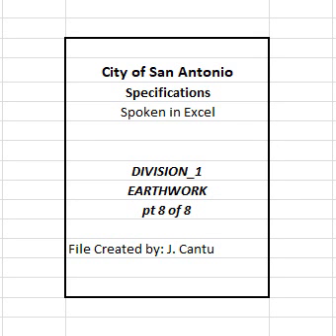This price is full compensation for shaping existing material, loosening, mixing, pulverizing, providing cement, spreading, applying cement, compacting, finishing, curing materials, shaping and maintaining shape, replacing mixture, disposing of loosened materials, processing, hauling, preparing secondary subgrade, water, equipment, labor, tools, and incidentals.